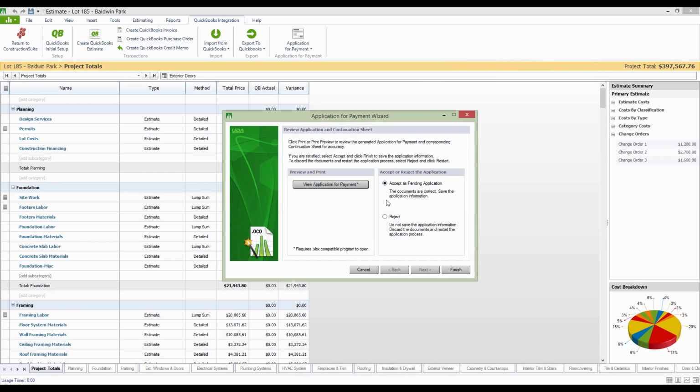The nice thing about that is once this gets to the bank and you click finish and it'll save it in there, they will now have on record everything that you wish to be billing for this period, and a lot of them will require that before they will release payment. Your clients may require something similar, especially for those of you who do large-scale commercial projects, or if you work with architects on large residential projects. I typically see a lot of people requiring those as well.